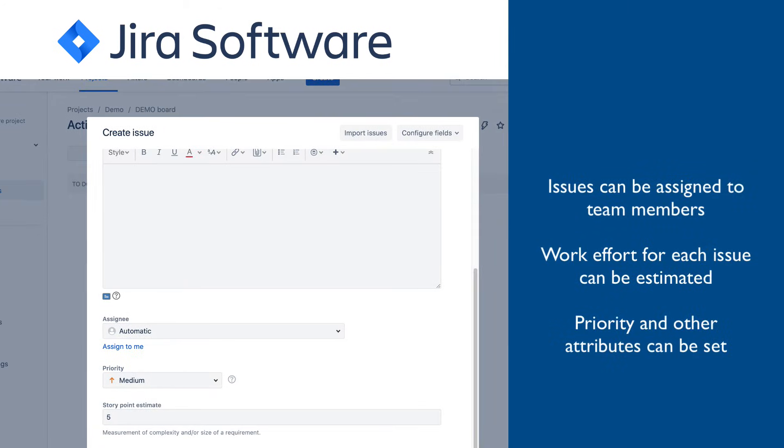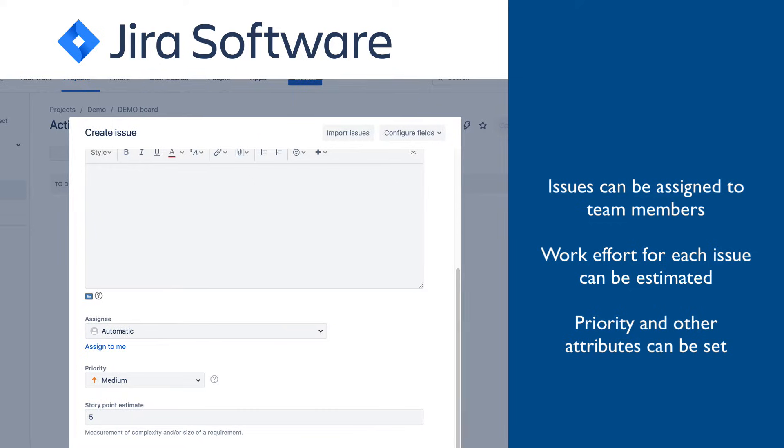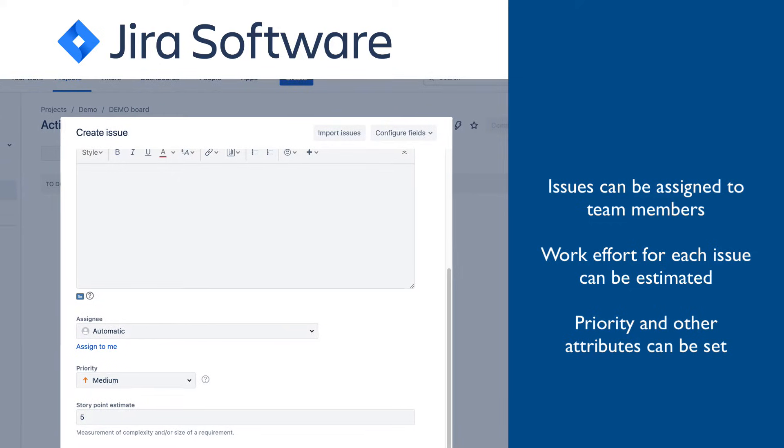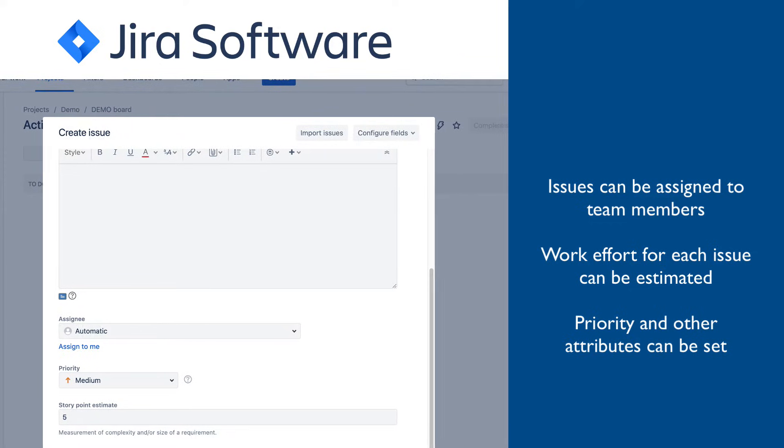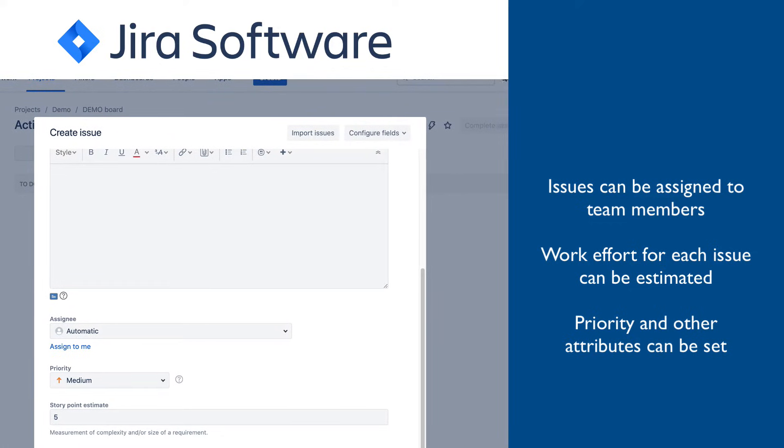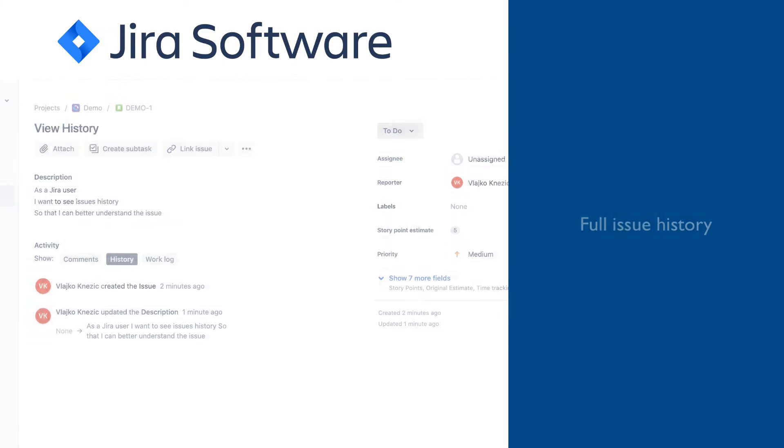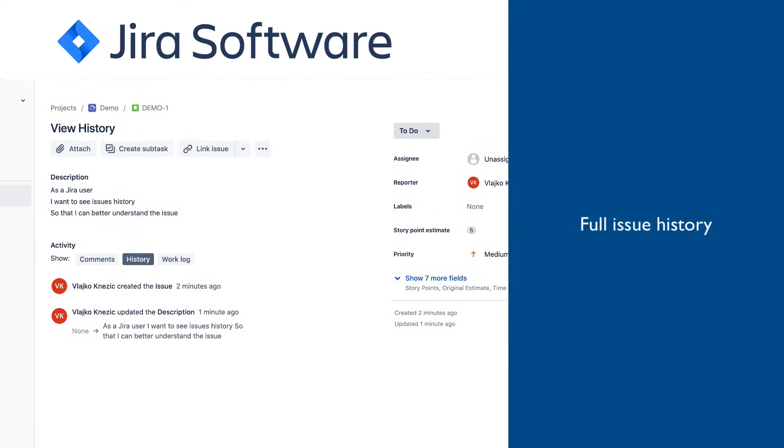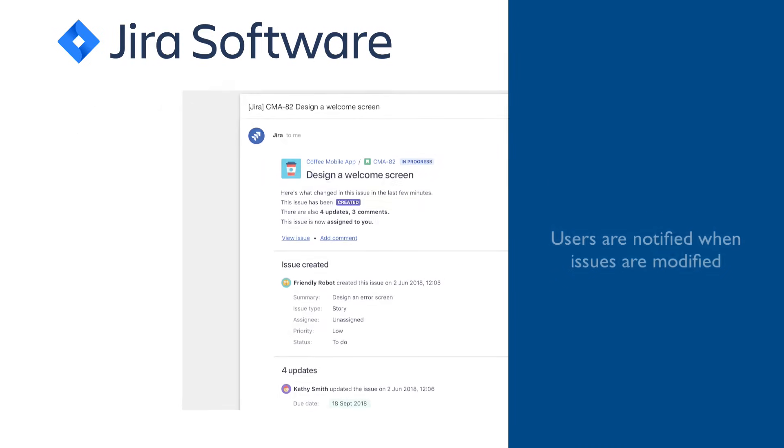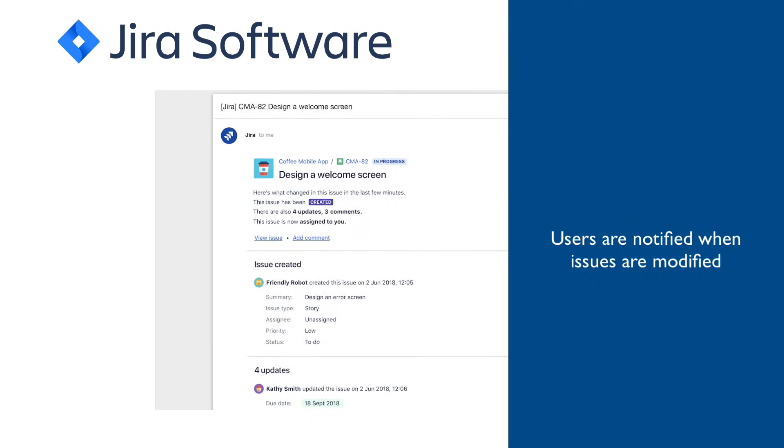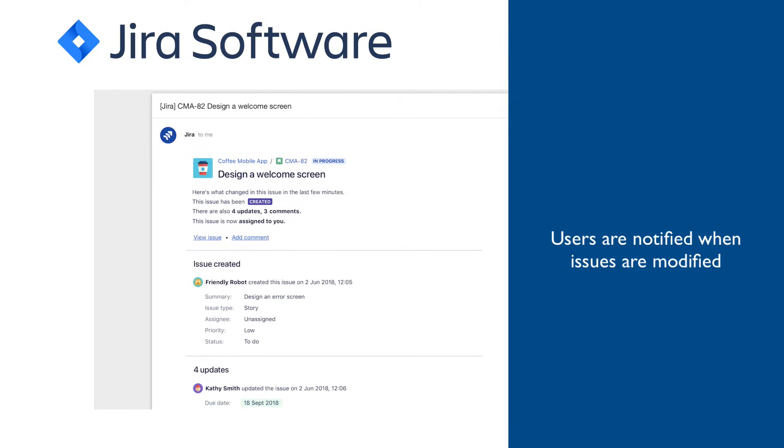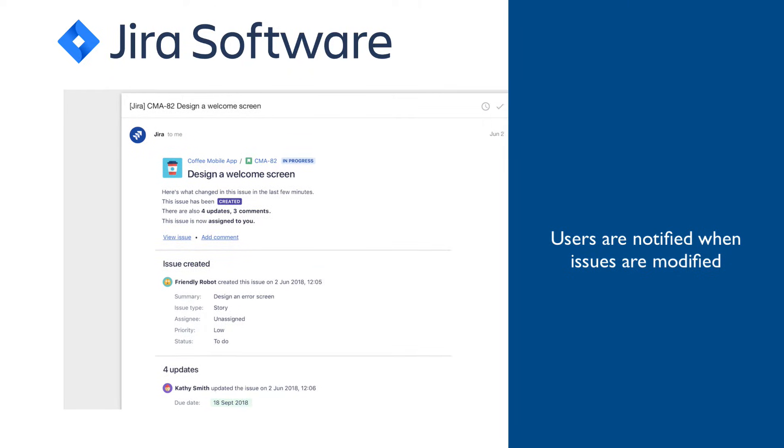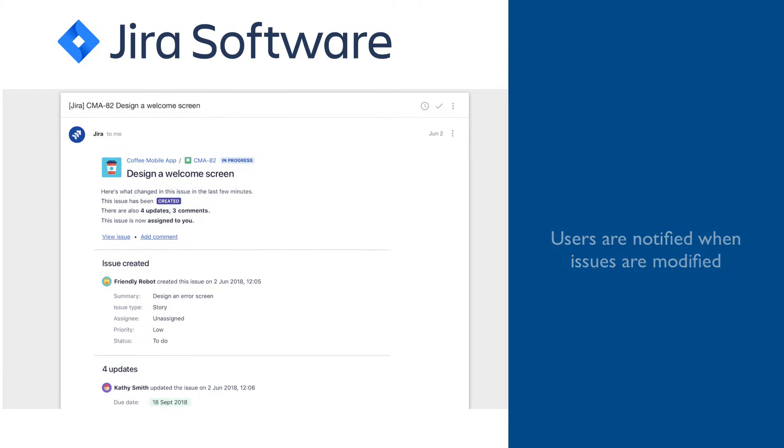Issues can be assigned to team members, and work effort can be estimated. Many other issue attributes, such as priority and dependencies, can be set, and the full history of issues is preserved. Users who are in any way associated with an issue can be notified any time something with the issue is changed.